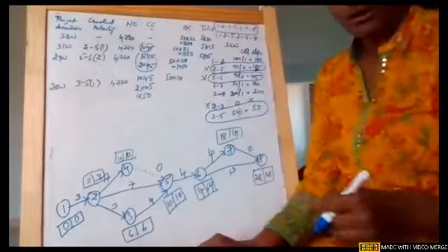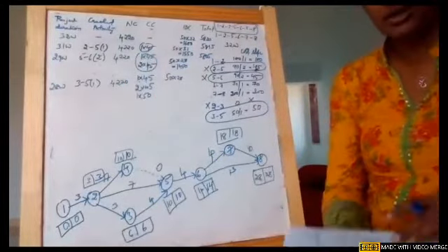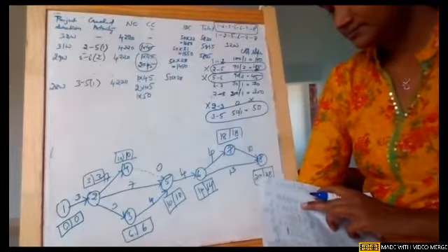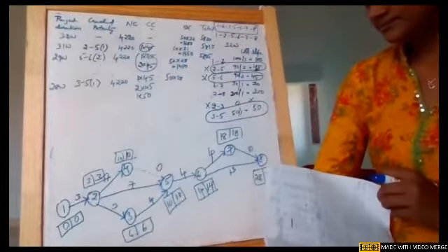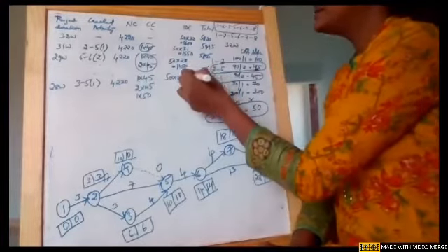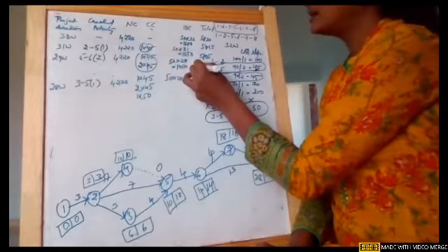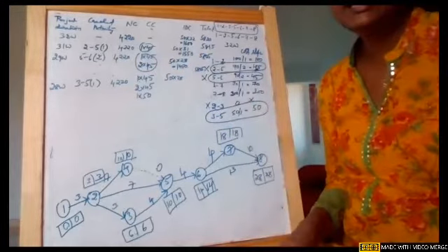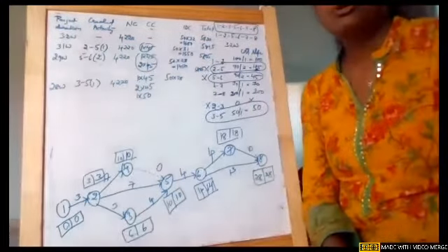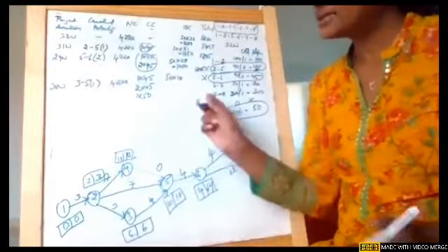So when I'm totaling all this, the cost which I got is 5805. Again, I got the same thing. So girls, there is neither an increase nor a decrease. It is the same as earlier. Okay. And the entire network is critical now.